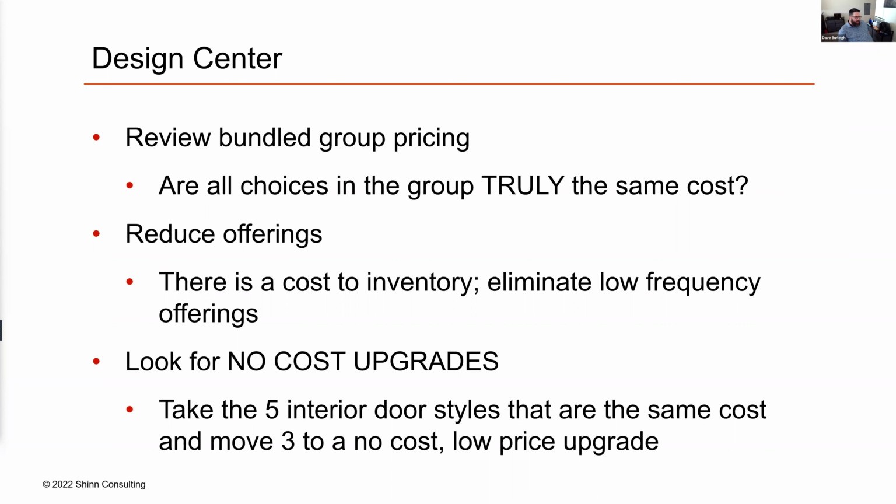Yeah, so the big areas that I'm seeing this in definitely are countertops, cabinets, and plumbing. I don't want to just look at what the group costing is to me. I actually want to start asking my trade partners to show me the actual cost of everything within that group, so that I can identify: do I have one cabinet door, one faucet, or one line of granite or quartz that's actually a higher price, which has been driving my group pricing up?